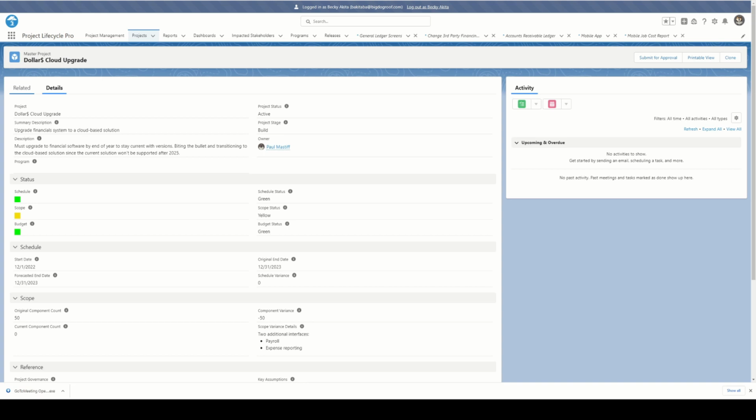Requirements are grouped by project component, and then components are grouped into releases. If you have labor estimates per component, now you'll have labor estimates by release, so you can plan a release date based on the size of your team, or determine the size of the team required to hit a fixed release date.